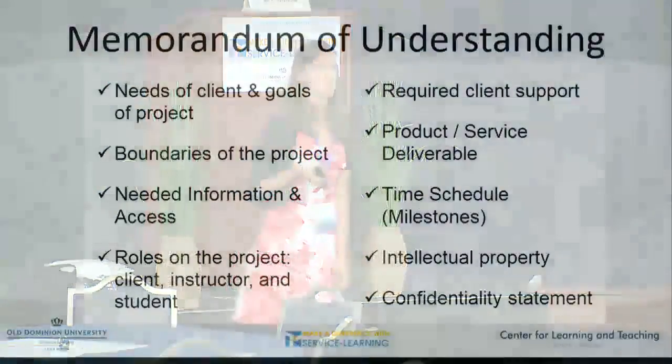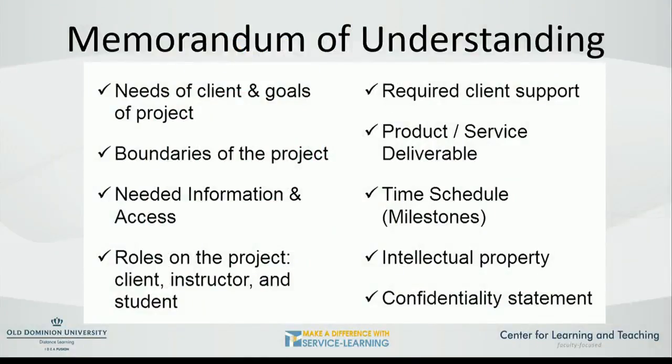Memorandums of understanding. I'm sure anybody here who's done global health, you probably had to fill out memorandums of understanding or you have your students filling out the contracts. If you're working with a nonprofit organization, word of advice, call it an MOU, call it a memorandum of understanding. You use the word contract, you scare people away. They're going to bring in their lawyers, and it's going to become a huge issue. And again, administration here will let you know if you have a question on whether you should have a contract. But for a lot of these service learning projects that we do here, an MOU will suffice.